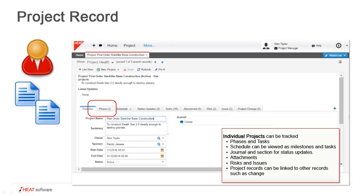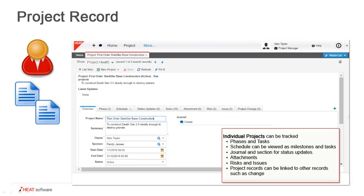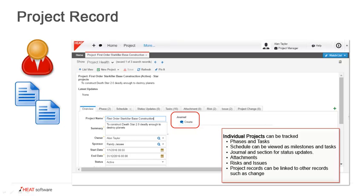Projects are broken into phases and those phases are broken into individual work tasks. Each project requires at least one phase. Within those phases, the tasks break down the actual functions that have to be done. The scheduling can be viewed as milestones and as tasks, and these can also be seen in a calendar format. There is a journal and a section for status updates, and there's an area for attachments.